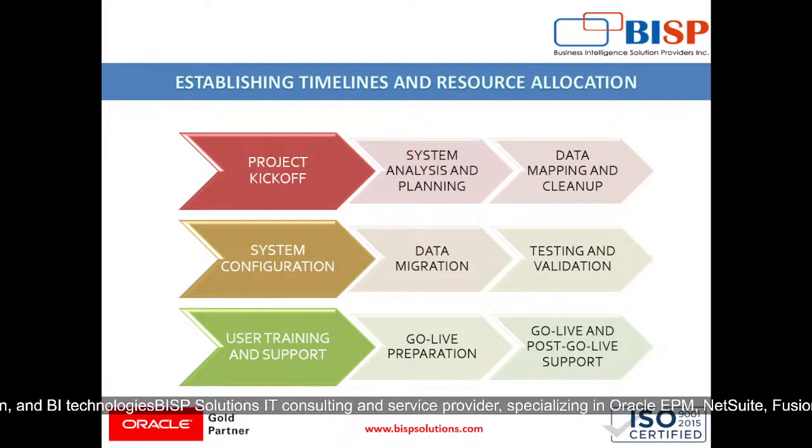And we will be designing NetSuite structures like COA, entities, workflows like that. Then data mapping and cleaning up is mapping QuickBooks data fields to NetSuite equivalents, which will take around 4 to 5 weeks for the same.